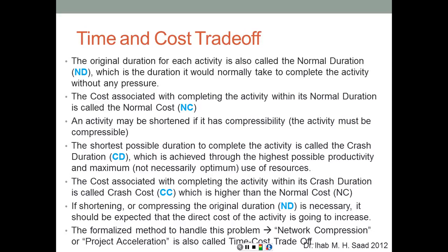An activity may be shortened if it has compressibility, or the activity is called compressible, which means if I add more resources, these are going to result in shortening the duration of the activity. In this case, it's called a compressible activity. In some cases, you might find activities where whatever resources you add are not going to shorten the duration. In this case, it would be called an incompressible activity, and it would not be wise to add any resources